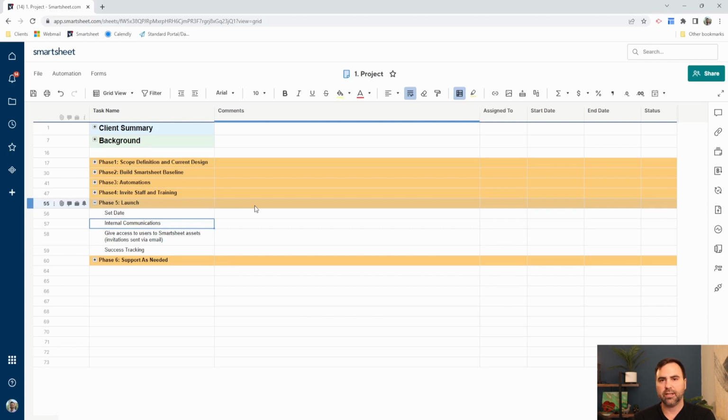Should there be a weekly newsletter that goes out to the user base to let them know the status of the project, what's coming up, what to get ready for? This falls into that change management of projects. People need to know if their world is going to be changing so they can prepare for that change. Now, again, this depends on the scope of your project, but if it is a massive scope, then you're going to want some type of internal communications going out to your end users, letting them know that change is coming so they can get ready.